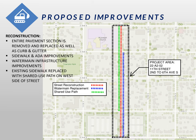As seen on the map and shown as the red line, the proposed improvements include street reconstruction for the entire project area — removing and replacing the entire pavement section, all of the curb and gutter, and any non-compliant pedestrian ramps. In addition, shown in green, it is proposed to remove the existing 4.5-foot sidewalk on the west side of 11th Street South from 2nd Avenue to 5th Avenue South and replace it with an 8-foot shared use path. Notifications and letters were sent in 2022 to adjacent property owners, and the design of the path follows the downtown Moorhead plan, connecting the MSUM area with downtown Moorhead. The next phase of this path will start at 2nd Avenue South and move north during the 11th Street underpass project, which is planned to begin in a few years.